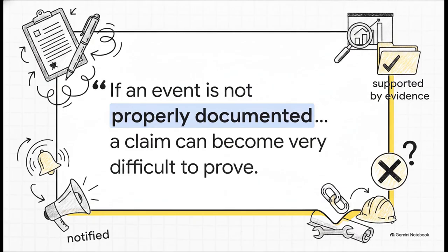There is this sort of unwritten golden rule in the construction industry. Basically, if an event isn't properly documented, notified, analyzed, and fully supported by evidence, well, it might as well have not happened. A claim isn't just you pleading for some extra cash. It is a highly formal, evidence-backed assertion of your legal entitlement.